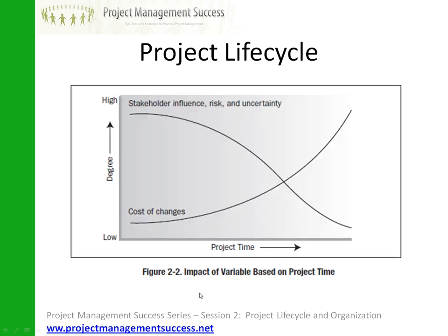Now this next image is actually quite a good one. It shows project time along the bottom here, and a high to low scale over here. At the start of the project, the cost of the project and also the cost of changes to the project are obviously a lot lower because you haven't actually built anything yet.